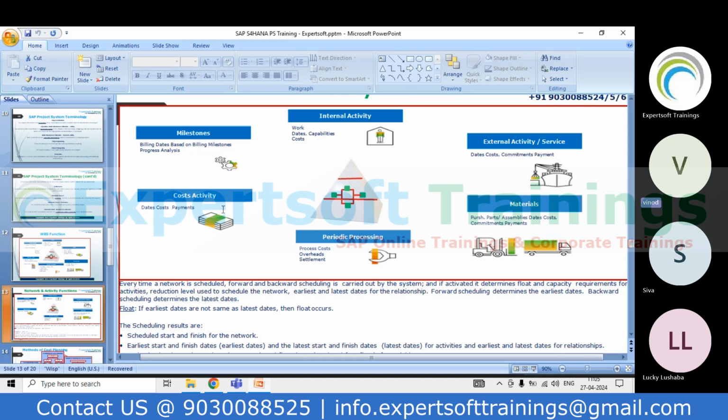Similarly, network activities cannot perform any revenue-relevant planning for revenue postings, but they work indirectly with reference to your milestones. If I use a billing milestone against the network activity, these network activity-based milestones will be copied to the sales order, and as per that, once you perform these network activities, the system will allow the sales team to raise the billings.